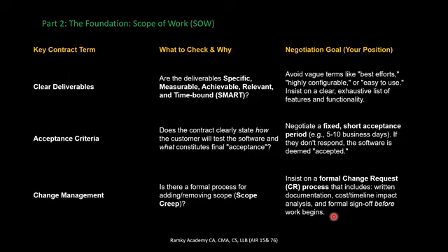In these 30 days, if any work got delivered, or if the contract is not signed as effective from 1st Jan, there will be difficulties for the parties in order to take into the revenue or to change any terms and conditions from the effective date. So, in order to avoid all those complications, it is always better to sign the contract in advance, before delivery of the work.